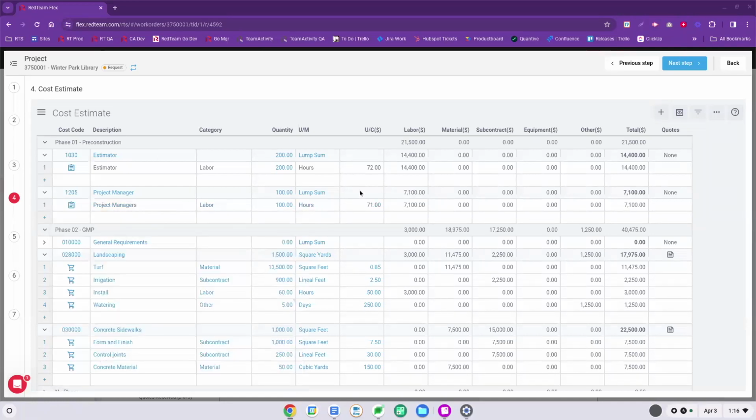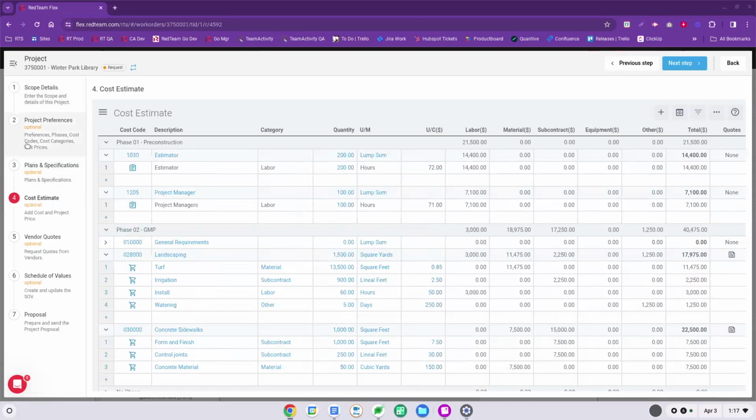But what's important about this is that what unit prices does is lets you negotiate that price up front with your client, right? In this case, I pulled in my project manager. It's labor units, right? So I've got my labor for my PM. I know what that costs me per hour, and so I have my unit cost. But what this is going to automatically do as well is if I have adjusted the unit price side of it, and that's done in this second step when you're setting up a project, you'll have a section called unit prices in the project preferences.